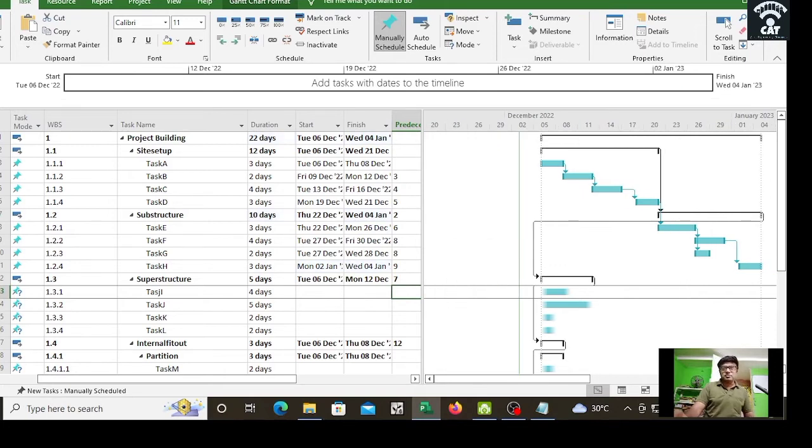You can see there's a small slider there, you can do that. See the first one, the site setup, December 6 to December 20. One task is counted, then the next one, like that it goes. Again the second, where the predecessor is at the same level, it will be at the same date.